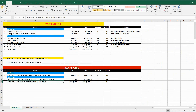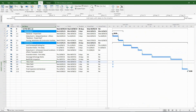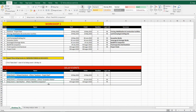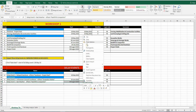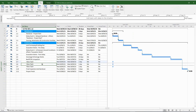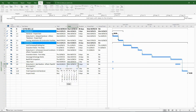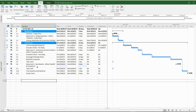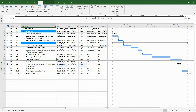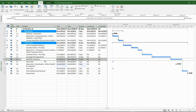At this point, I would like to suggest that you pause the video and try to carry out the third impact independently, then come back and check if you got it right. Before commencing the impact of a new delay event, please update your program with contemporary records and analyze any changes to the project critical path. If there are any delays to the project critical path post your previous update, they have to be allocated to the party responsible, and the delay analysis table should be populated with all the pertinent information. Once this is done, you can proceed with TIA and impact the network with the next delay event. I'm now in the process of inserting a fragment for the third delay event.